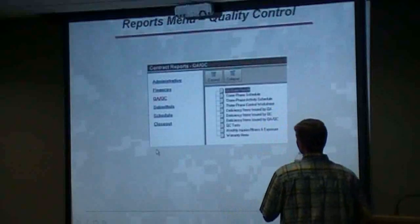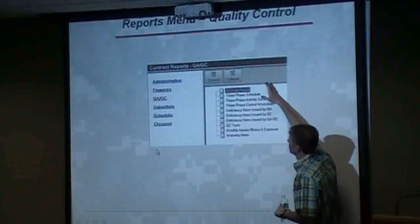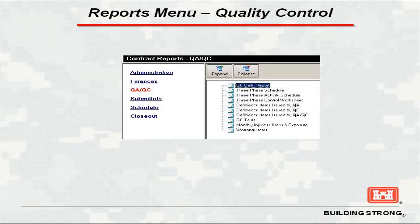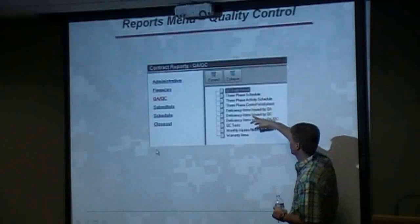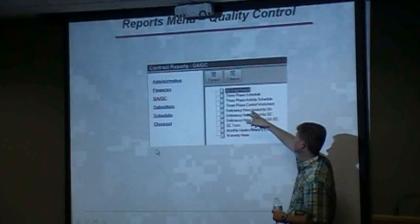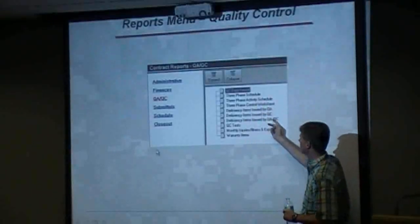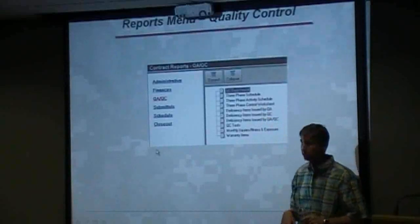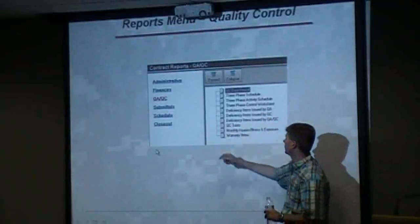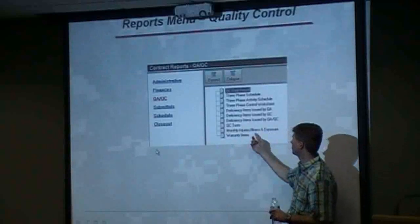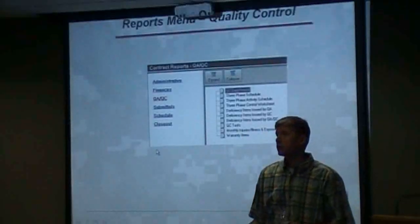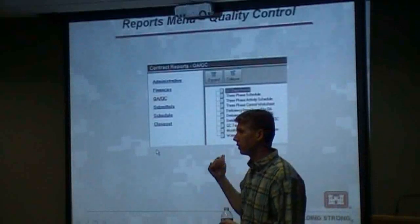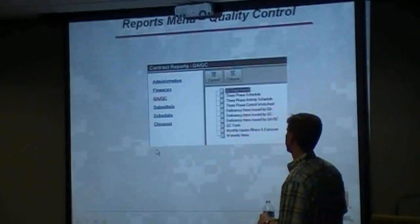Down the line is QA/QC — we've already talked about this several times. Here's your three-phase control worksheet, which is your preparatory sheet. You can pull a full schedule to see when things are happening. You also have deficiencies issued by QA/QC with a combined list option, quality QC tests, monthly exposure hours, and a warranty report. You can use all of these as individual reports and run them on a monthly basis.